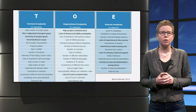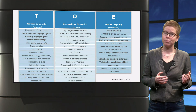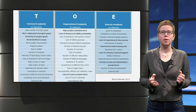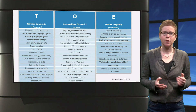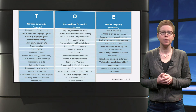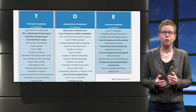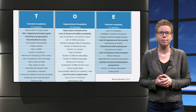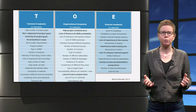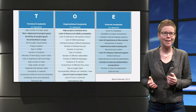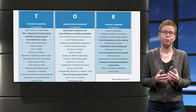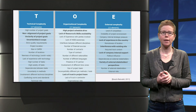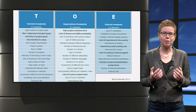The elements in the O dimension cover items related to experience, trust, project team composition, resources in general, etc. — mainly related to organizational aspects within the broader project team. The elements in the E dimension cover relations with external stakeholders, market conditions, politics, etc. — mainly elements related to the context the project is performed in. We will certainly not claim that our framework, published back in 2011, is the one and only way of characterizing project complexity, but it is effective and it helps increasing awareness.